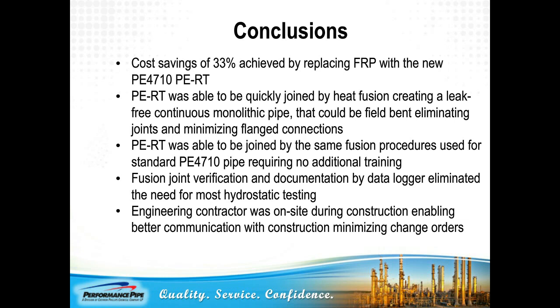They felt that the joints wouldn't be tested at the hydrostatic pressures anyway, based on past experience and recommendations by the manufacturer. And then they only needed to do the hydrostatic testing where they had flanged connections or transitions to the FRP. The engineering contractor was also on site during construction, which enabled better communication with construction and minimized change orders.